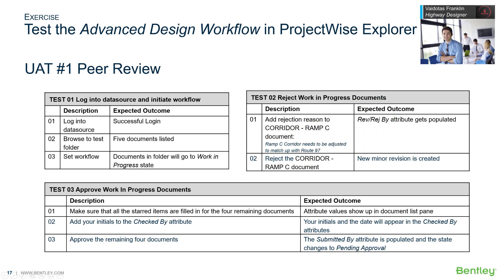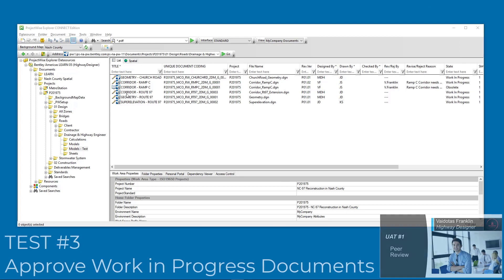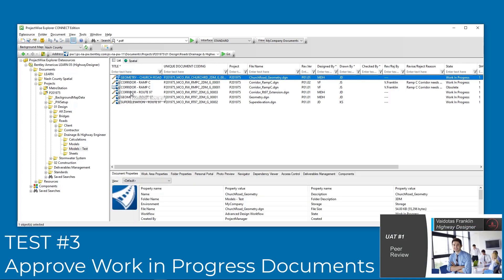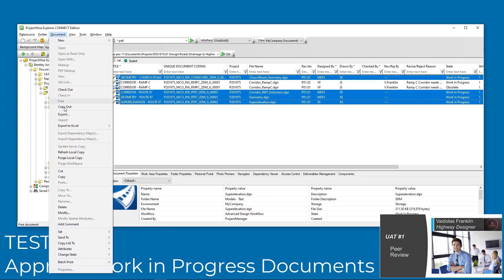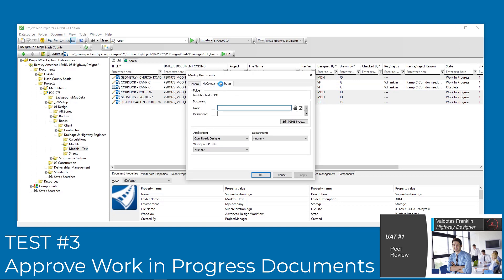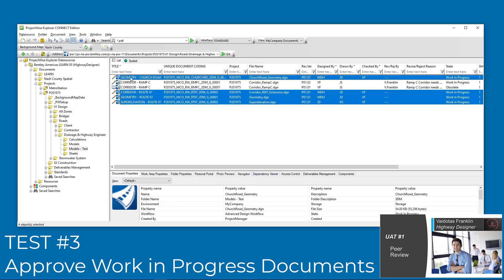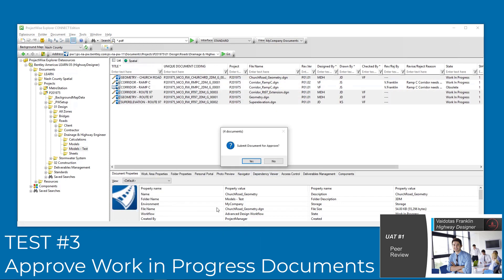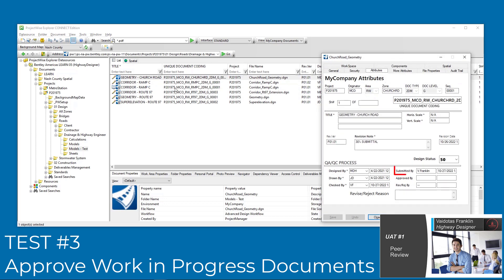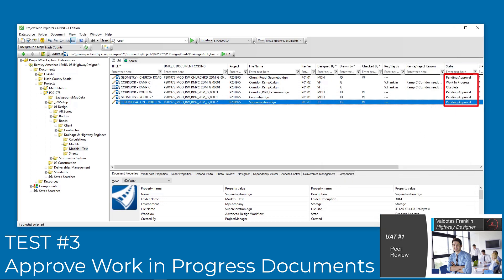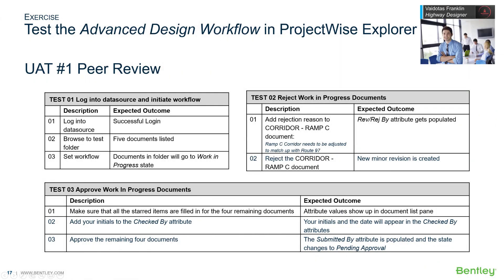Test 3. Viadotis has received the other models and reviewed them, and all seems well. He fills in the Check By attribute for all of them at once using the modify tool. He then approves all at once and verifies that the Submitted By attribute is populated and that the state changes to pending approval for each document. Test 3 passes.